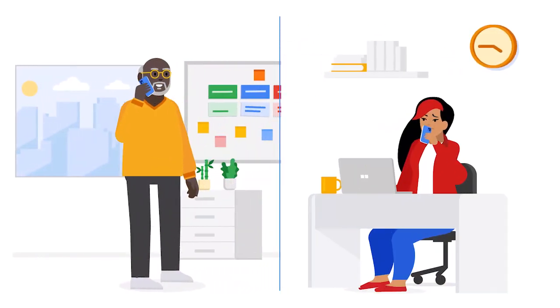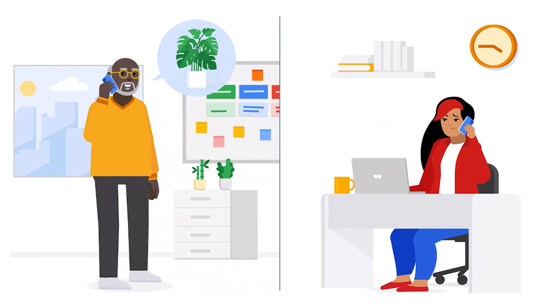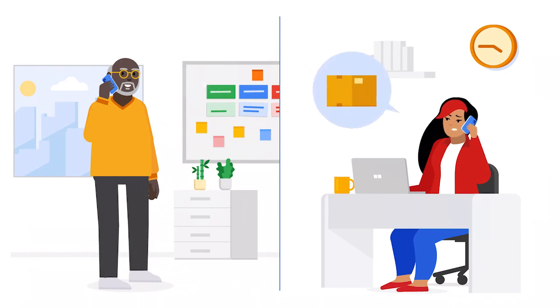Quality assurance is where you'll make sure that you and your clients are getting the exact product you contracted for. So at Project Plant Pals, this is where your team will inspect options for planters and perhaps sit in on the durability testing. If you make plans for your plant provider to handle the durability testing on their own, make sure you are tracking their progress and checking in regularly.